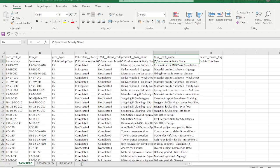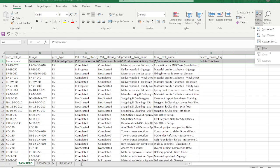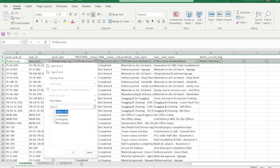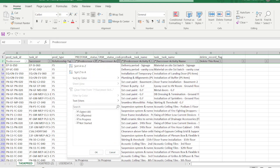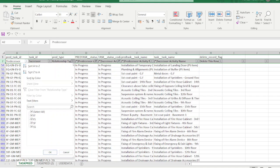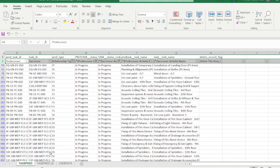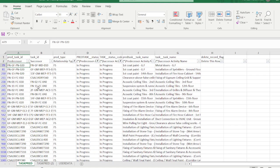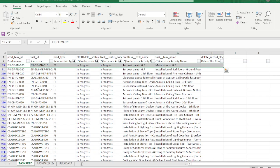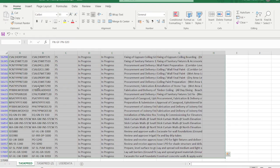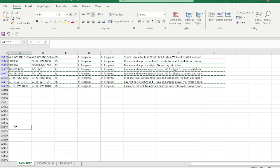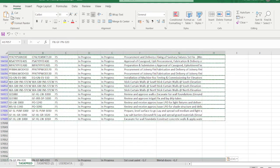All the relationships are exported. Before starting your operations, I recommend you make a copy of this file so that if anything goes wrong you have a backup. Press Shift, Ctrl, and left mouse button, then drag and drop — it will copy the sheet. Now select row number two and press Filter. Our first case is that both predecessor and successor are in progress, so from the filter select predecessor 'In Progress' and successor 'In Progress'.